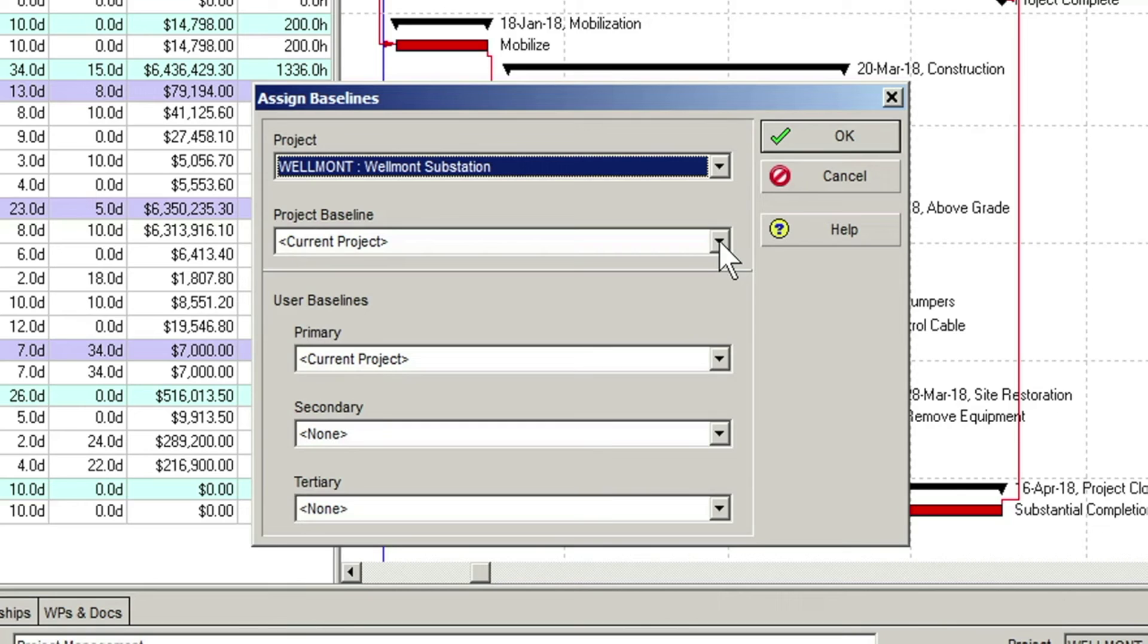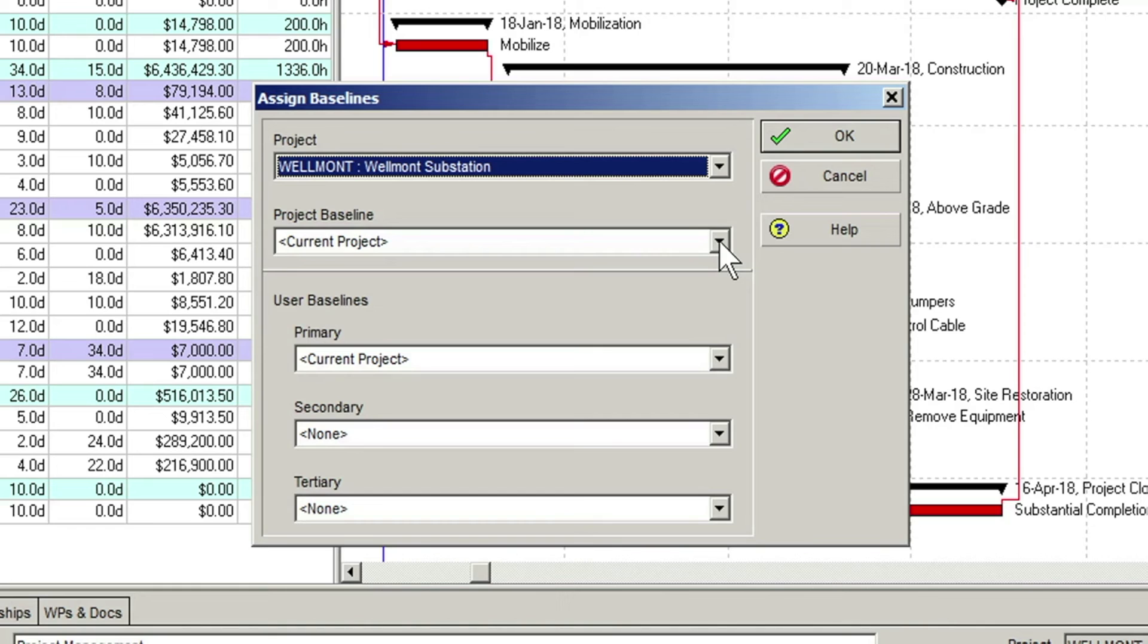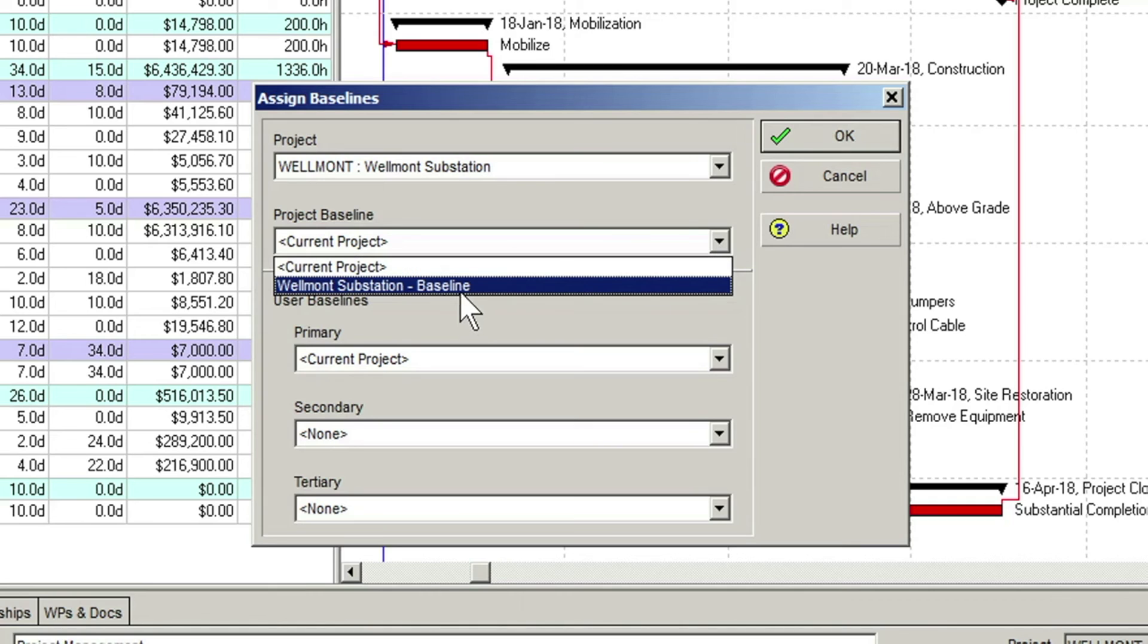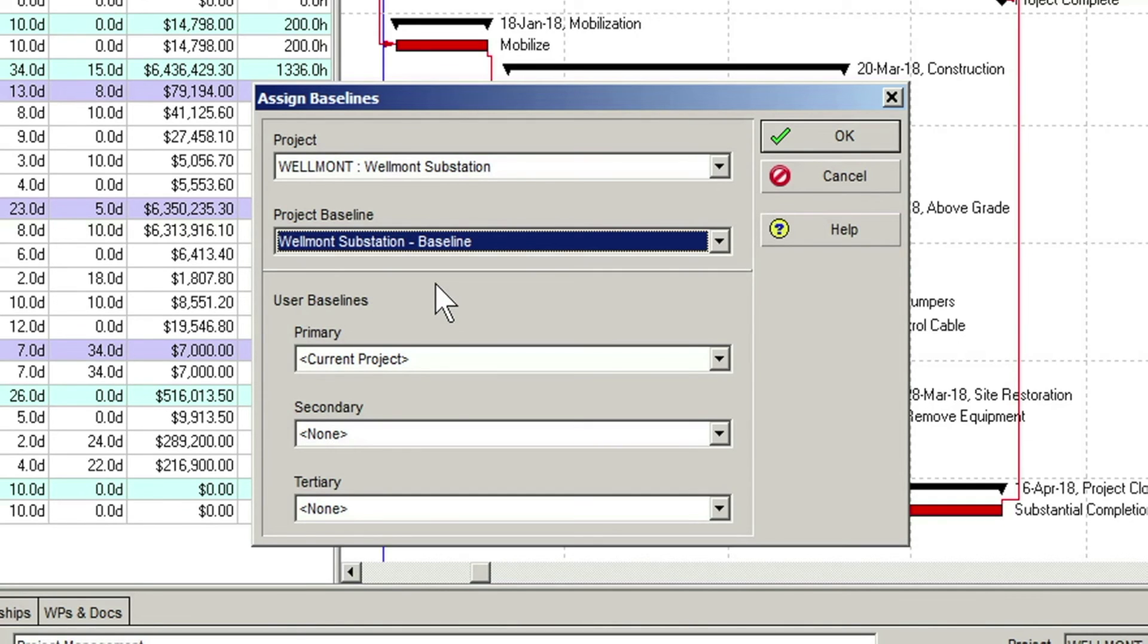This means that the current project is actually doubling as a baseline. If baseline dates, durations or costs are being displayed in the project's table area, these fields will simply match the current values of the project. Not very useful. What we need to do here is set the Project Baselines field's value to the Wellmont baseline we just created. This takes care of the Project Baseline assignment and now ensures that if the current plan begins to change, the Project Baseline fields in P6 will reflect the baseline values, not the current project's values.